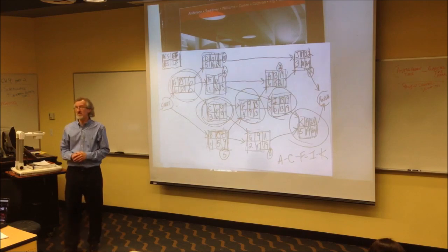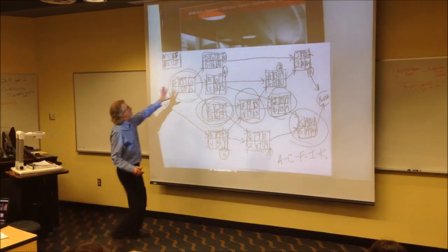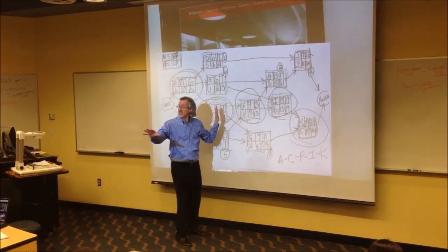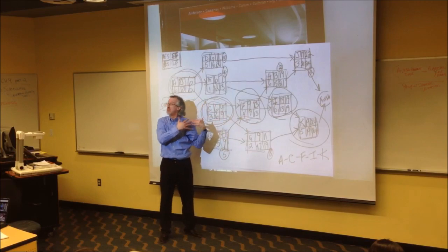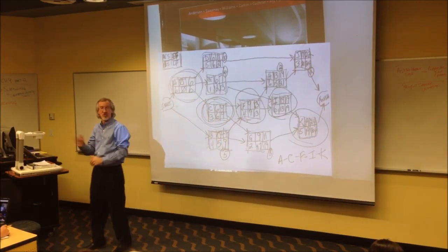So the top is the largest, the bottom is the smallest one. When you're going forward, you've got to make a decision. You always pick the largest of the choices. And then when you're going back, you always pick the smallest of your choices. That's how I would write that down to refresh when you're doing forward and backward pass.